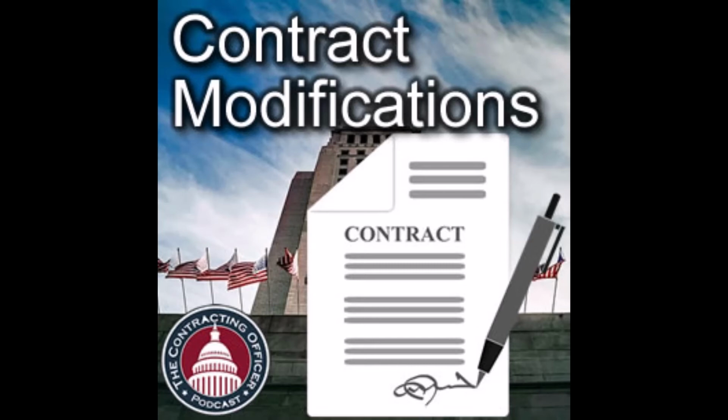And then other times I struggled with this, earlier in my career, when I didn't realize that even something as small as, I say small, a $300,000 addition to the contract, on a large contract, was still a big enough number that people above my counterpart had to see it, and they would come to the meetings and they wanted to negotiate with me. It was all crazy. So understand that process, or you're going to lose so much time.